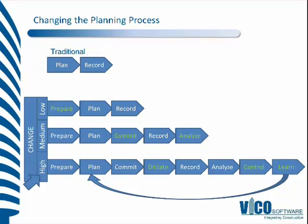We need this process in order to put work in place. After analysis, we need a method of controlling and tracking progress — metrics like planned percent complete, and the forecasting mechanism within the location-based management system to manipulate planned resources and implement control actions. Then there is the learning process: the causes of deviation, the reasons for failing on certain tasks, going through root cause analysis and taking that back into the planning stages.